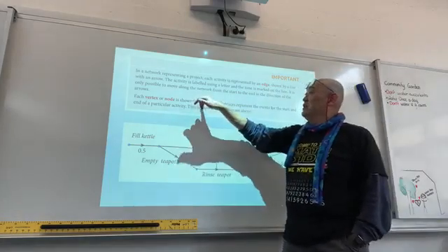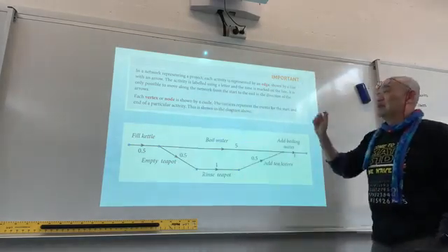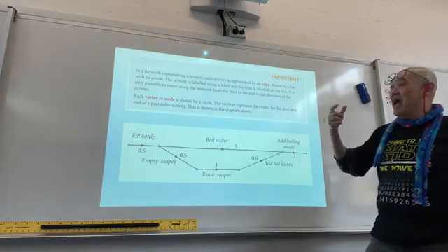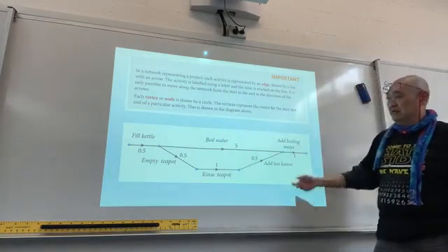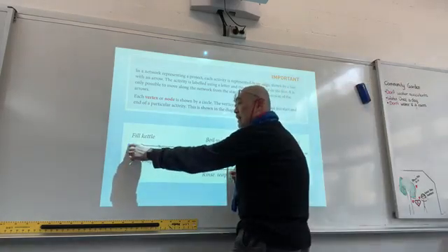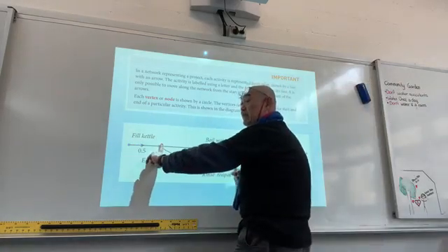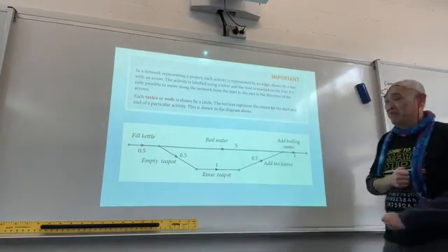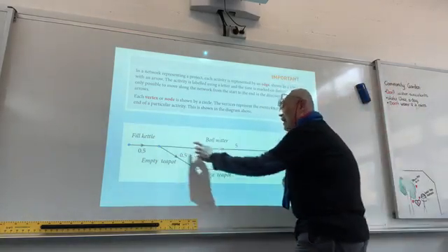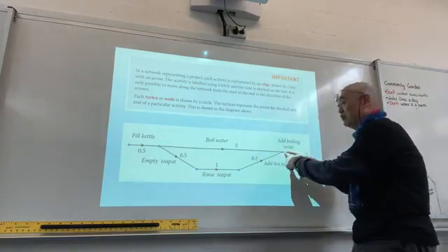Each vertex or node is shown by a circle. The vertices represent the event for the start and the end of the particular activity. So if you look at this, this is the start of the activity filling kettle, end of the activity filling kettle. So you take about 0.5 of a minute. Boil water, when you start doing that, that's about 5 minutes to boil the water.